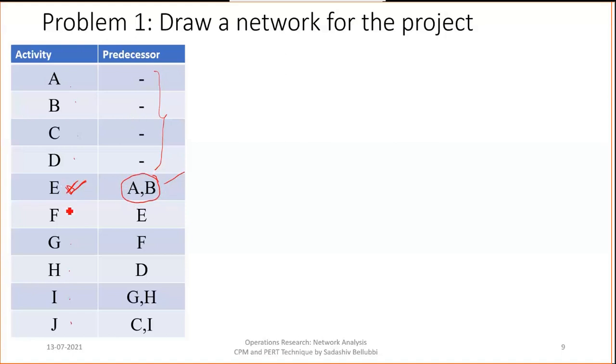And for F, E should be finished. For G, F should be finished. For H, D should be finished. And if you want to start with I, then G and H should be finished. For J, C and I should be finished. So this is the way the problem is given.